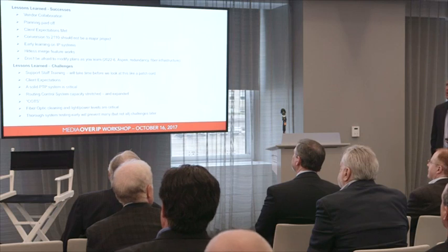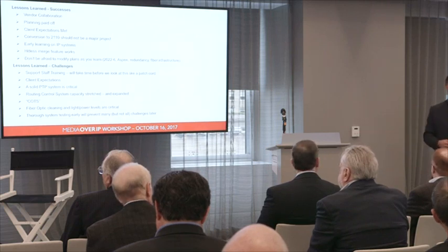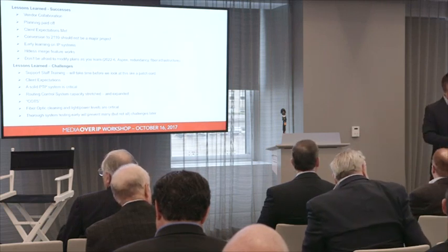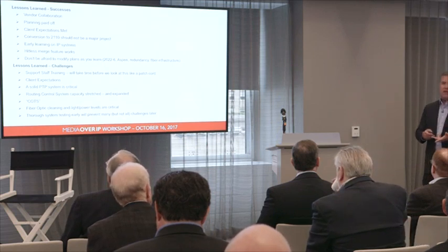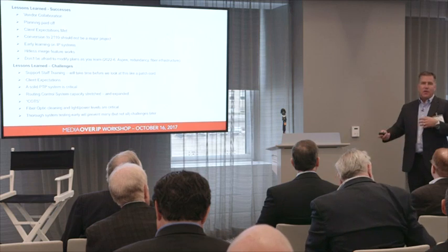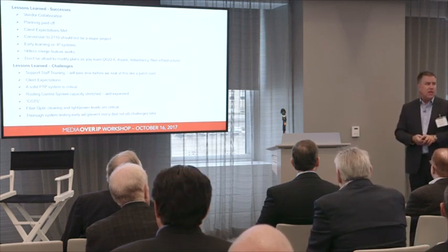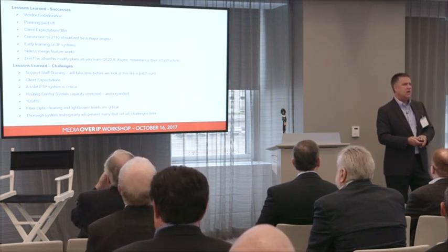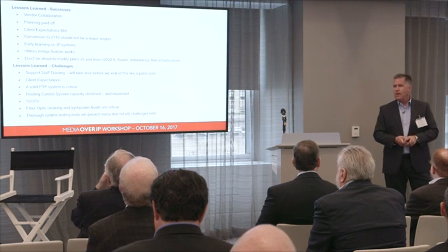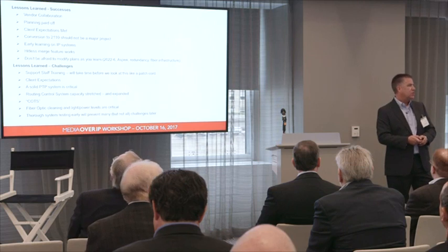We learned that the hard way. It didn't fail on air, but it was close to it. When I say a solid PTP system, not just knowing you have PTP, but looking at all the failure modes across the board: sync generator failure, switch failure, redundancy across the board, and testing all that stuff. It's hard to admit mistakes, but that was one mistake that we made in our implementation. And I can't emphasize enough thorough system testing across the board. We probably would have seen that a little bit sooner had we pushed harder for some testing.